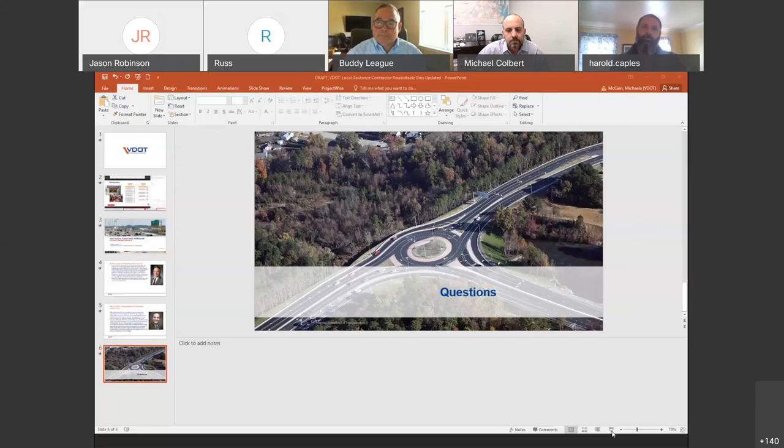But typically what happens is there's either something that's unidentified that we run into, or there's a cable line or gas line that is not relocated in the right spot. Those types of issues on projects typically cost us a considerable amount of time. When you consider how we plan the project and how we begin to execute it, and then we run into utility conflicts, it throws the whole project off.